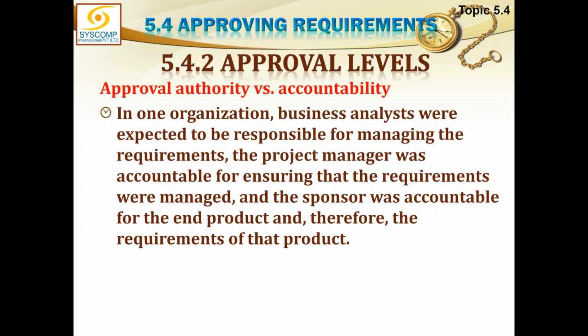As far as the project manager is concerned, he was accountable for ensuring that the requirements were managed. You see, only the management of the requirements is the accountability of the project manager. What is the business analyst's role? Business analysts were expected to be responsible for managing the requirements. You see the difference between responsible and accountable. The business analyst is just responsible, whereas the project manager is accountable for the requirements being managed, and the sponsor has the utmost accountability for the overall product and therefore all the requirements of that product.